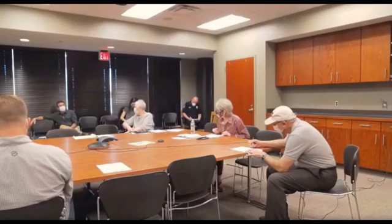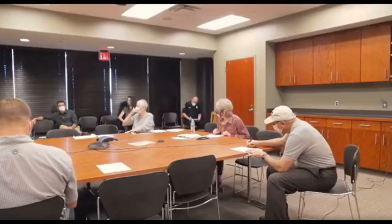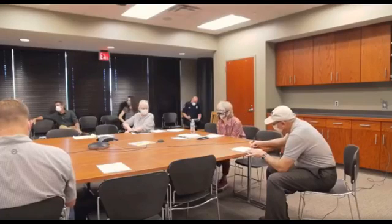It's a 30-day process. Bids come in, works with the budget. And I could see a notice to proceed by the end of July. Okay, all right. Just want to give you another time frame of how this fits together going forward, if y'all want to do it.